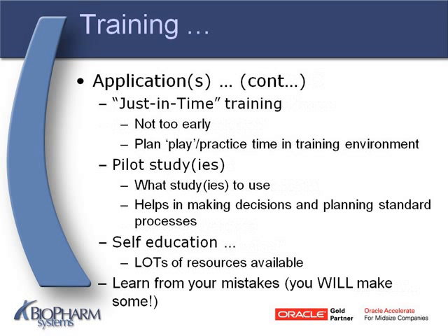Also in the application training, I think just-in-time training is very, very important with something like Oracle Clinical. It's a huge application. There's a lot to learn. Even when you're just taking the basics class, you can't learn it in a week or 2 weeks. I've been using it for over 16 years, and I'm still learning something new every day. So if you get that training too early, don't get your OC training in February if you're not even going to have it installed and validated and available until June or July or August.